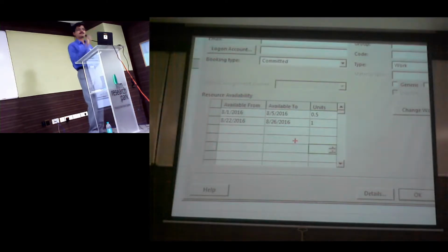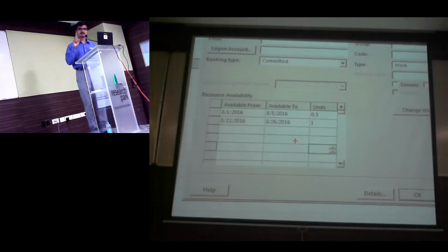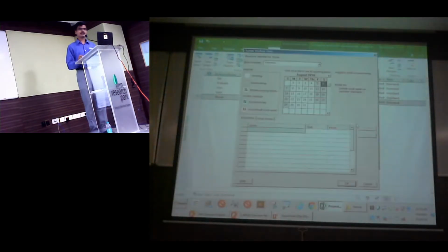So right? Here is where you capture the vacations also, right? Yeah. Vacation you don't capture here. That's wrong. Vacation should always be captured in the calendar. So if I want to, okay, let's say Durai goes on a vacation on 23rd. Right now 23rd is a working day. So whether he is working in this project or another project, it is a vacation.